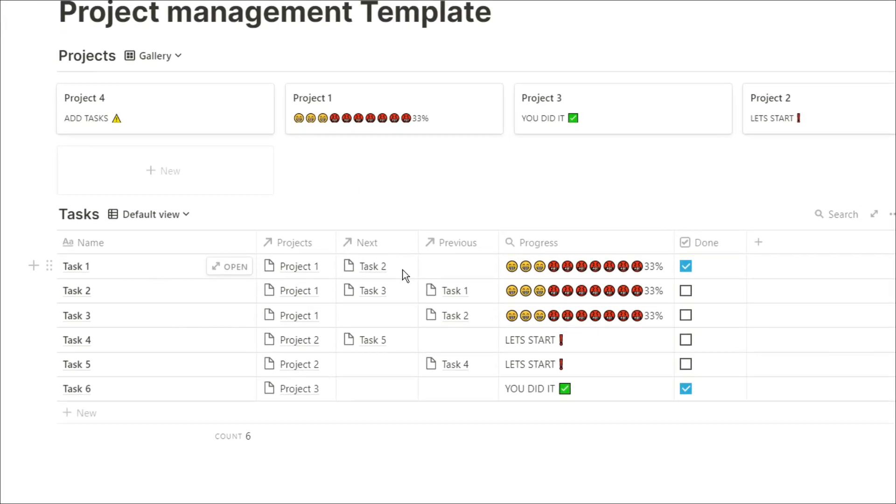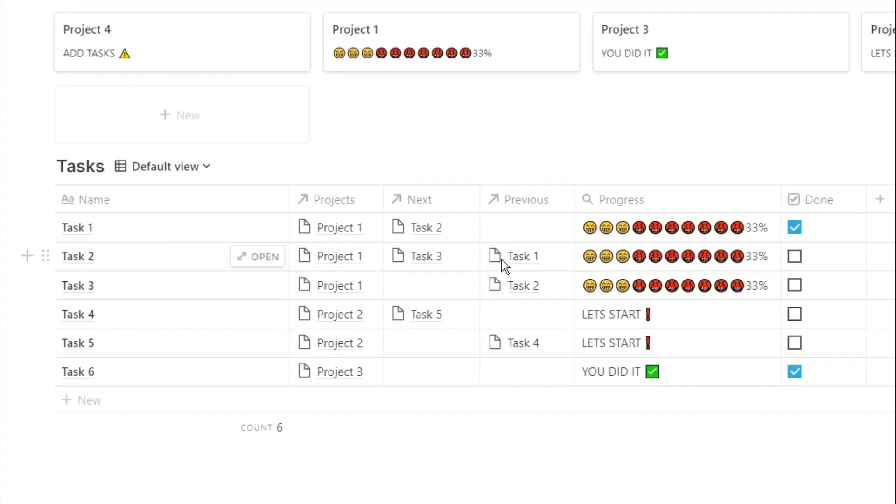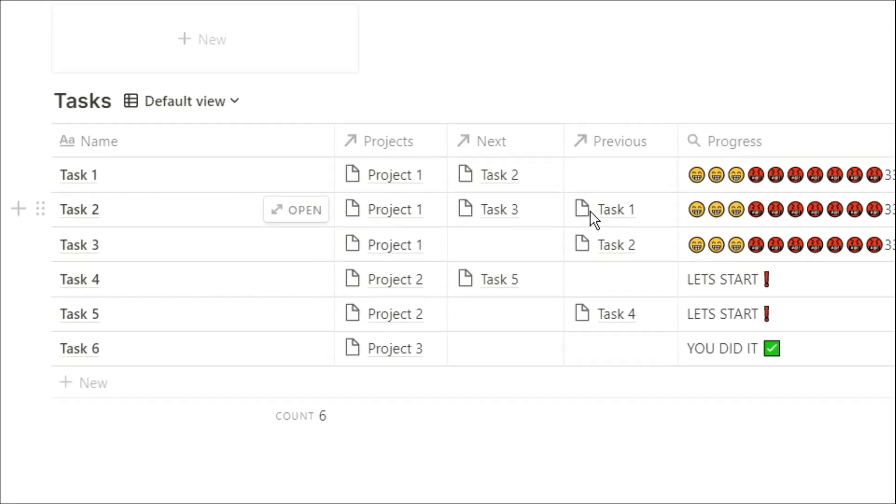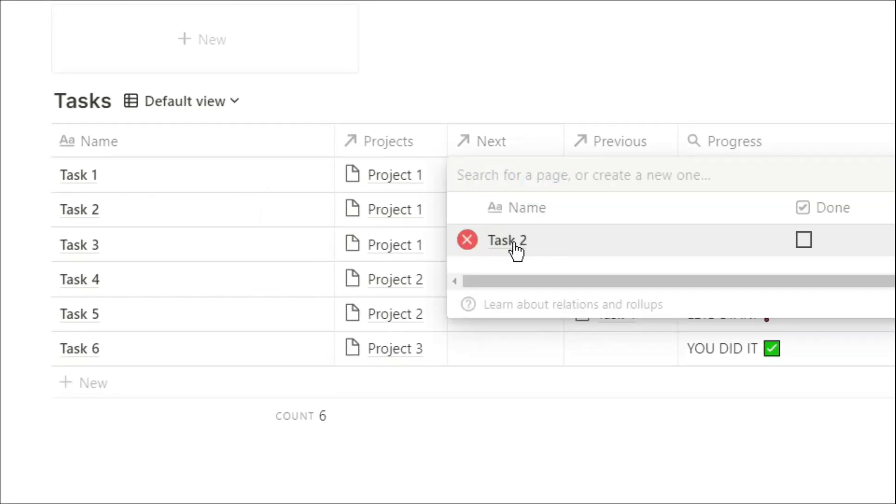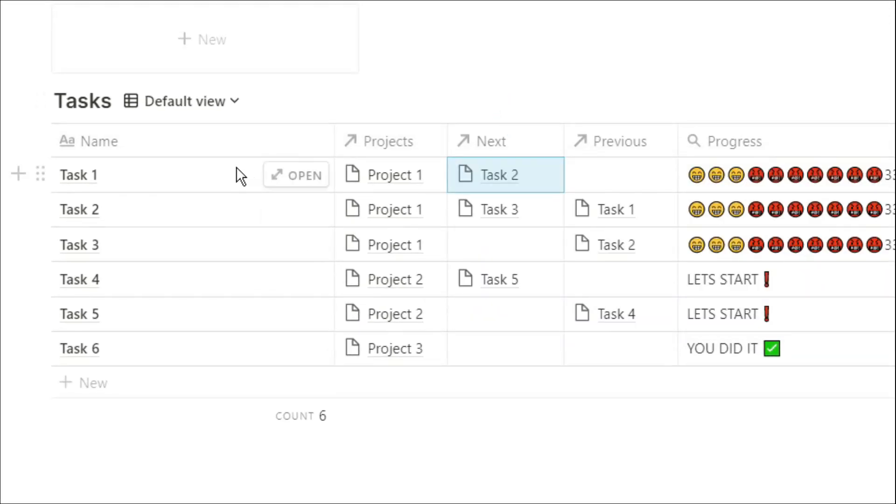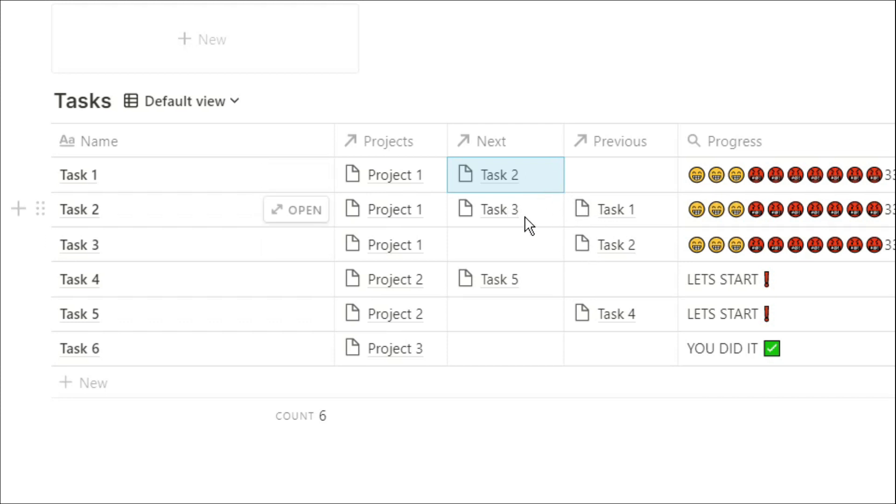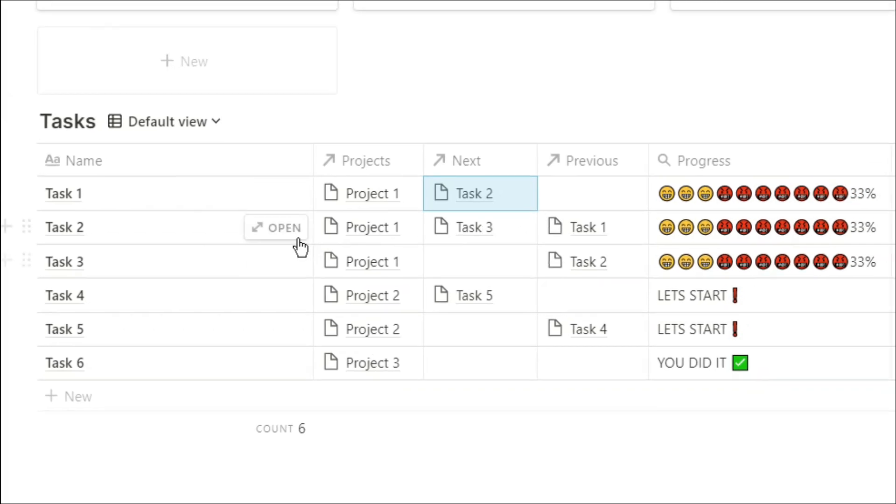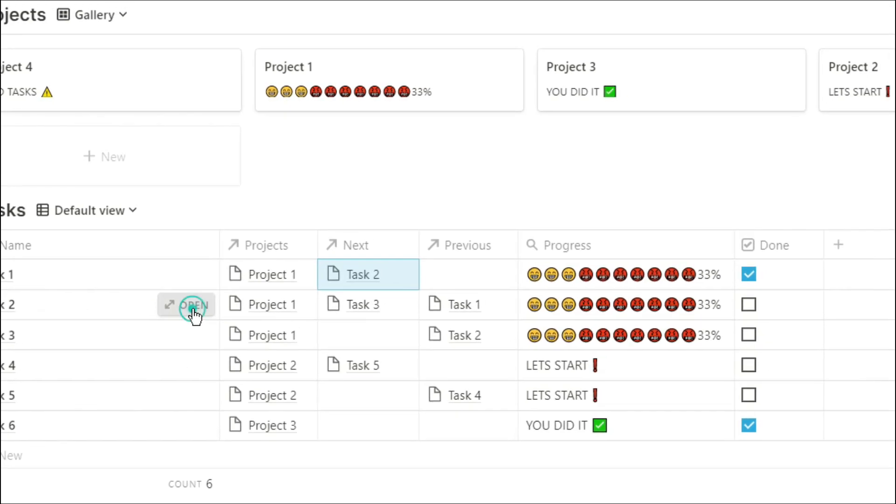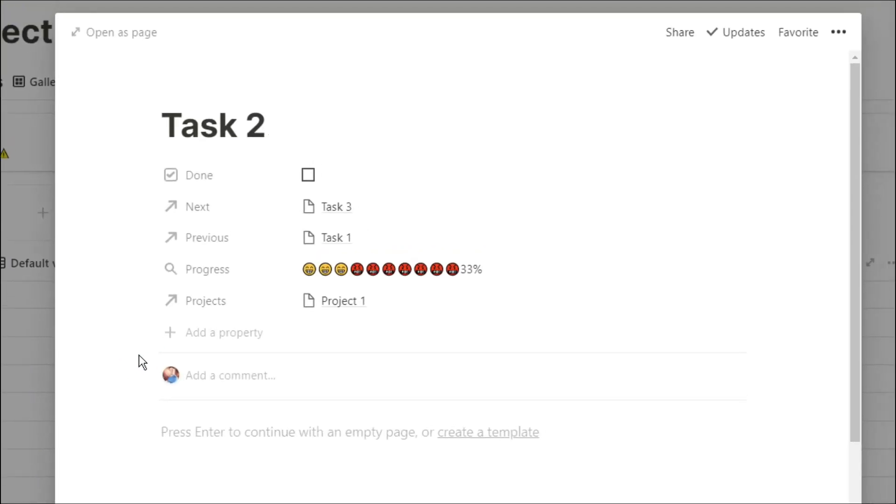Now going down to the task database, I've actually created dependent tasks. So I've linked task 1, task 2, and task 3 together. So I know, after I've completed task 1, I need to go to task 2. Then, once I've completed task 2, I need to go to task 3. Once I've completed task 3, I know I've completed the project, because there's no task in the next relation.